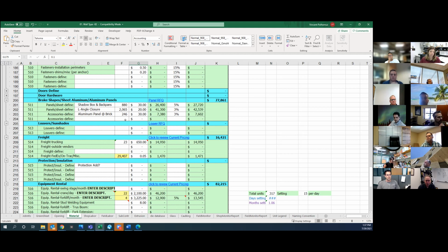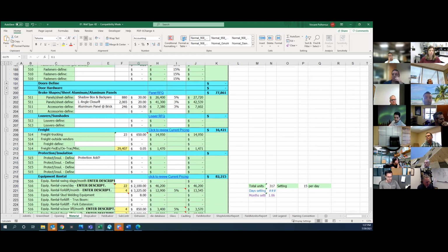And so, yeah, you'll have that standalone estimate for doors, standalone estimate probably for auto operators, right? Sometimes things like even that go on your curtain wall, like a sunshade, may have its own standalone estimate. And that's because we needed to price it separately. So we needed to keep it separate. So just job by job, you have to look and just see how that was broken up.